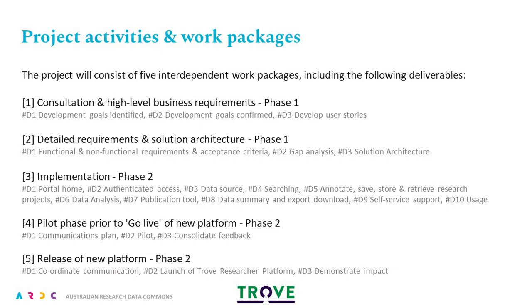Work package four will be the pilot phase prior to go-live of the new platform. The deliverables will include a communications plan, a pilot to demonstrate the functionality, followed by a beta release to seek feedback, and then consolidating the feedback and making changes where possible. The final phase, work package five, will involve developing and implementing the release of the new platform, including coordinating the communications plan, launch of the Trove Researcher Platform, and demonstrating the impact.